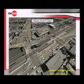And what you're seeing is, of course, the shoe fly runs everywhere except at the crossings. That's by way of illustrating the fact that, as we're constructing this, we're still going to be running cars across each one of these three crossings. So we have to be a little bit innovative in the way we stage this to minimize delays. So during this time frame, all three crossings will remain open. There will be periods where there will be temporary detours.